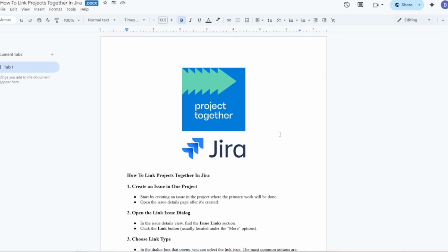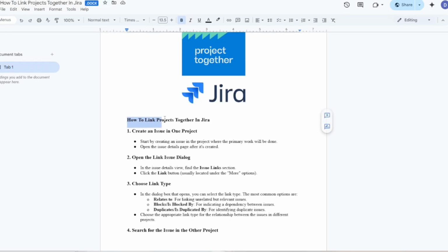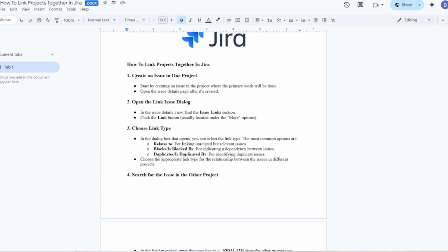Everyone, in this video I'm going to show you how to link projects together in Jira. So step number 1 is to create an issue in one project. Start by creating an issue in the project where the primary work will be done. Once you're done with that, open the issue details page after it's created.